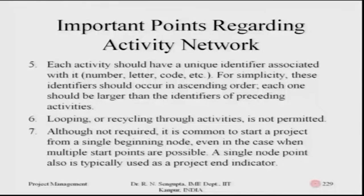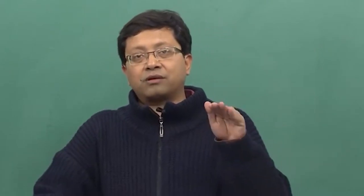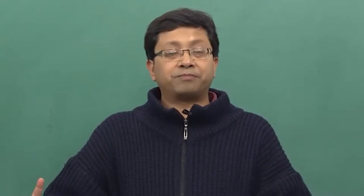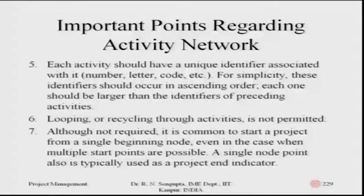Looping or recycling through activities is not permitted. Remember, the looping concept would be a part of consideration when we go into GERT and QGERT concepts — one of the main references for that concept is by Pritzker. Although not required, it is common to start a project from a single beginning node, and even when multiple start points are possible, a single node is also typically used as the project end indicator to signify the project has ended.